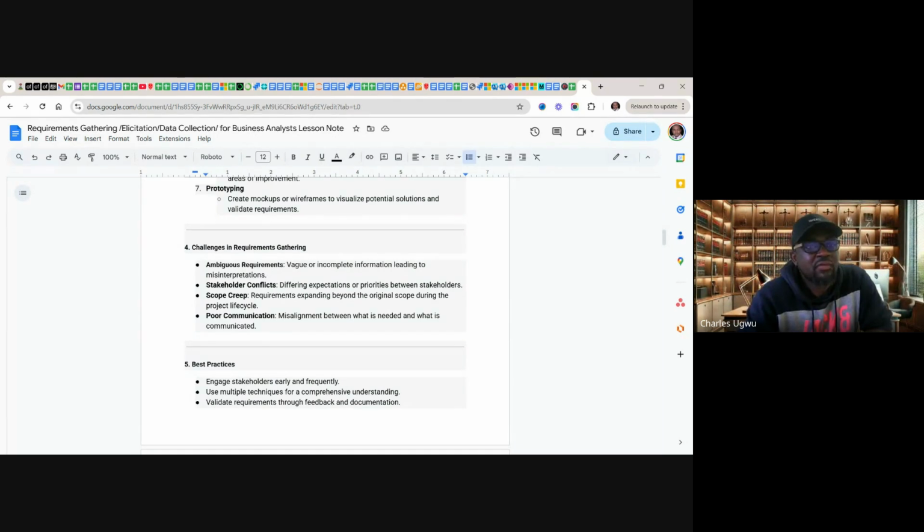We know we have different modules, sales modules and marketing modules. If they are requesting marketing modules, you can't just say yes. If they need marketing modules, they need to make additional budget for the marketing module, and they need to increase the timeline in order to cover the marketing module. So these are things you need to understand to avoid these kinds of challenges.